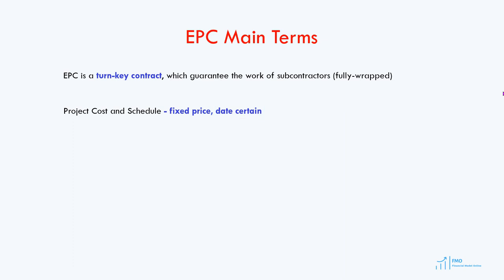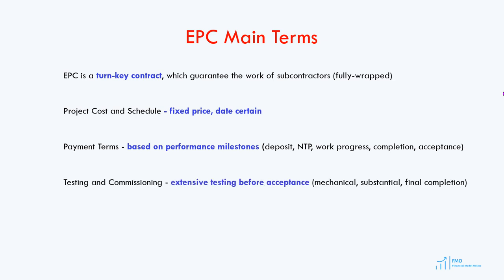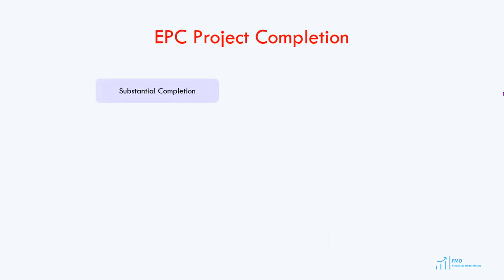When it comes to payment terms, payment to the EPC firm is typically made in accordance with performance milestones. The first payment is made when the notice to proceed is issued to the EPC firm, followed by smaller payments as the EPC makes progress, and the final payment is made when the project is accepted by the sponsor. Since EPC is a turnkey contract, there will be extensive testing before the sponsor can accept the project. The contract will include minimum and guaranteed performance levels, and the project can reach substantial completion if it achieves the minimum performance level. The project is typically ready to operate at substantial completion.